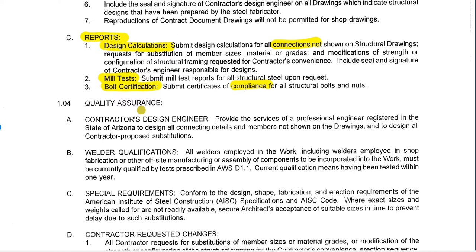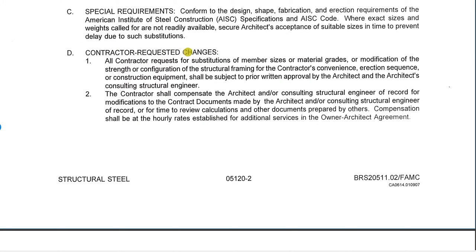The next section is quality assurance, which talks about things that may be performance specified. Connections in steel are typically performance specified, meaning the contractor is responsible for designing the connections. We also have things done in the field and in the shop, such as welder certification, the design engineer, and other special requirements. You'll also see the process for looking at changes on the drawings — different fab shops are set up to do things in different ways, so the steel fabricator can ask for substitutions in sizes to make things work a little bit easier.